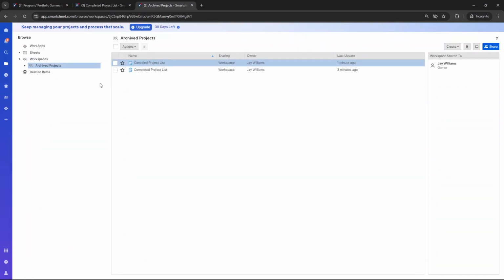One other thing I'd recommend doing if you're archiving is just have a workspace for your archived projects or whatever that you're kind of archiving. It could be, archive, whatever rows they are. Just have somewhere where you can store the sheets that you're running the archive. It just makes life so much easier. You can find them. Let's just say the auto archiving doesn't work as intended. You can find where they've gone to much easier if you have an archive projects workspace and store those base documents in.